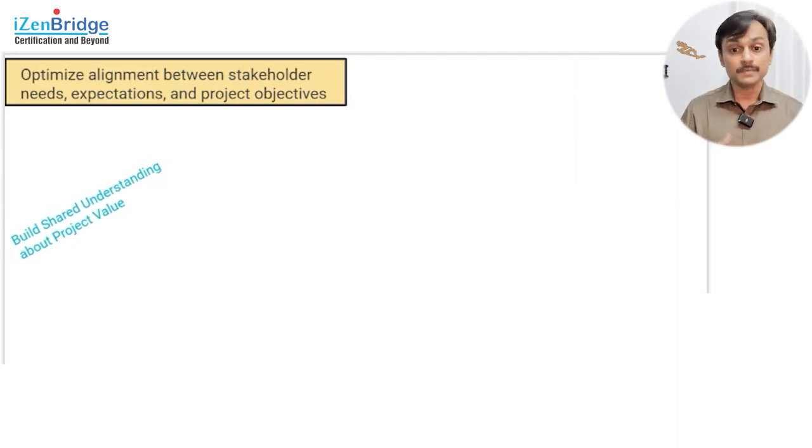So as a project manager, my job starts when we are doing the initial kickoff meeting: guys, this is what we are trying to do. If you have a difference of opinion, let's resolve it before we move forward. Even at the beginning, at a goal and value level, I'm not talking about the scope and requirement level, it is just at the goal kickoff meeting, we should have an agreement. The values, say success criteria for the project should be agreed in advance. Constraints should be agreed in advance. So that's something I need to do as a project manager.